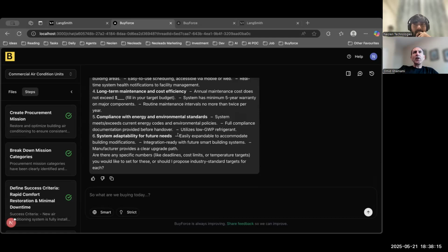One guy kept challenging me. He was a vice president, and he used the example of buses. He said, okay, if I get all this, it makes sense. But if I start putting in all these demands and requirements for what the bus needs to do, they just won't sell me the bus, or they'll add so much cost to what I need to pay in order for them to be willing to sign up. That comment stuck with me.